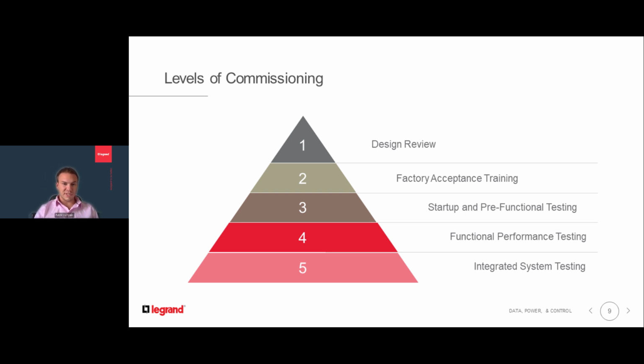One other thing that we see oftentimes is to have them do the testing from the manufacturing standpoint, because that gives them some skin in the game. Oftentimes they'll offer extended warranties when they do so, and they're not going to cover something that they don't feel is perfect and the install is correct. You get a nice unbiased opinion on it, whereas they weren't the ones that installed it. They're sending the correct people there to do it.